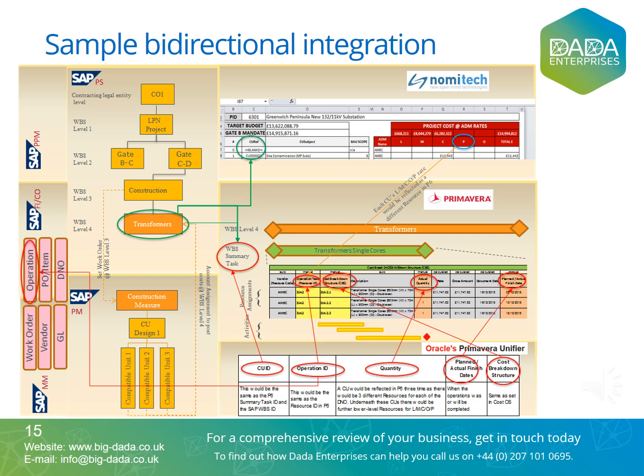Also, the integration of different enterprise systems can allow businesses to have a better and more accurate view of their organization and projects. Better forecasts from specialist planning software like Primavera can inform the percentage of completion (POC) reporting in SAP and what the likely estimate at completion (EAC) would be. In order to take advantage of the best of each application and be able to integrate the data, it's important to know how the different datasets will be joined. At what level of resolution will they be reported?